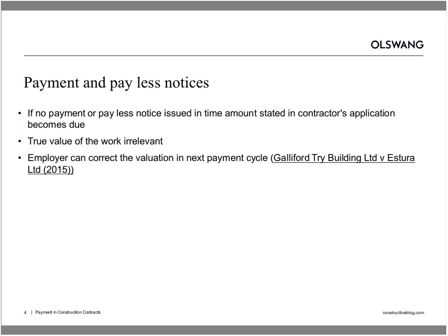And what we see in cases like ISG and CVIC is often this problem arises where the contractor makes a very late application, by which I mean an application that's made right at the end of the works, possibly after practical completion. I think in ISG and CVIC, it was effectively an indicative final account application for a very substantial sum of money. And of course, in those circumstances, there's simply not sufficient work remaining to make any adequate set-off to protect the employer. In those circumstances, all it can really do is wait for the final account stage, and that can be a very long wait indeed. And in the meantime, of course, it's carrying that insolvency risk.